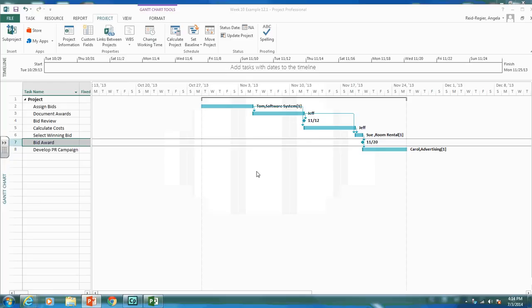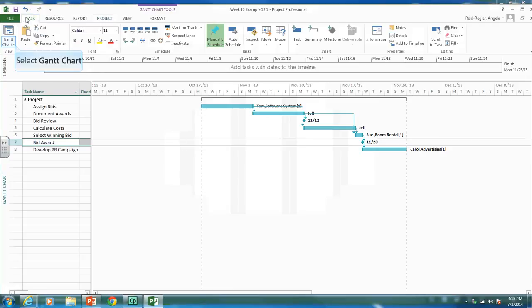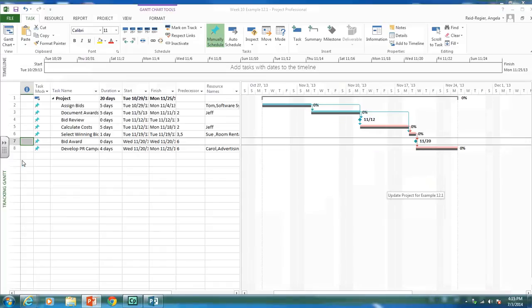The next thing to do this week is add status. The best way to add status and see what's going on is the Tracking Gantt chart view. In the Tracking Gantt, the gray bars represent our baseline — what we planned to do. For example, we planned to start the first activity on October 29th and have it complete by November 4th.